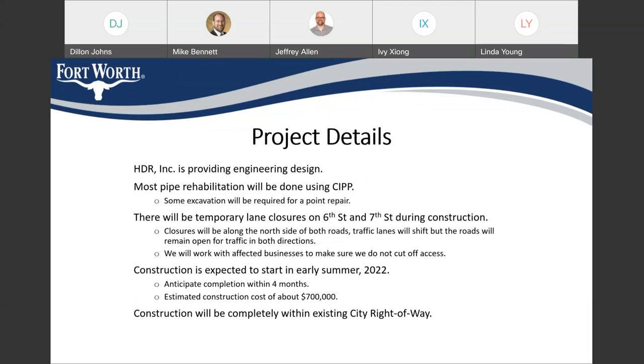So the turn lane for Henderson southbound will be impacted when crews are on site working. However, if the crews are not working through that manhole, the road will remain open. So our lane closures will be shifting as we progress through construction. Once we finish in one location, we'll open the road back up there and move the lane closures down to the next access points.